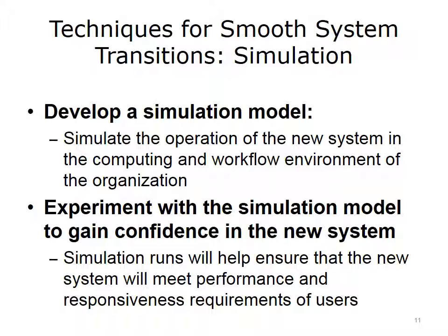Get actual patient charts or orders and have the staff begin to simulate working in the system. Hand out packets of scenarios that will take the staff 5 minutes to work through. These exercises will help the staff in transitioning to the new reality. These simulation runs will help give you the confidence that the new system will meet the performance requirements of users.